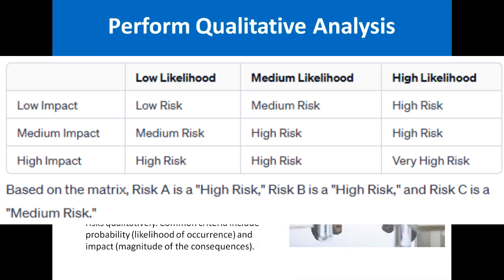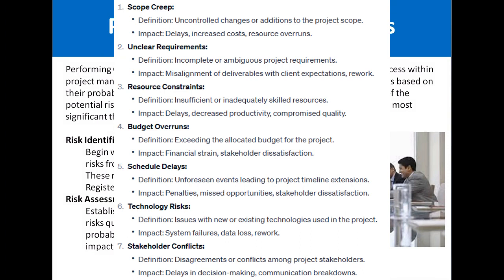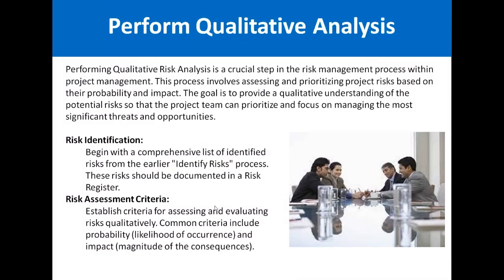Qualitative analysis is based on the concept of probability and impact — how many chances there are that a risk will occur and what the impact on the project will be. Risk identification begins with a comprehensive list of identified risks from the earlier 'Identify Risks' process. These risks should be documented in a risk register, which we start from in this process.